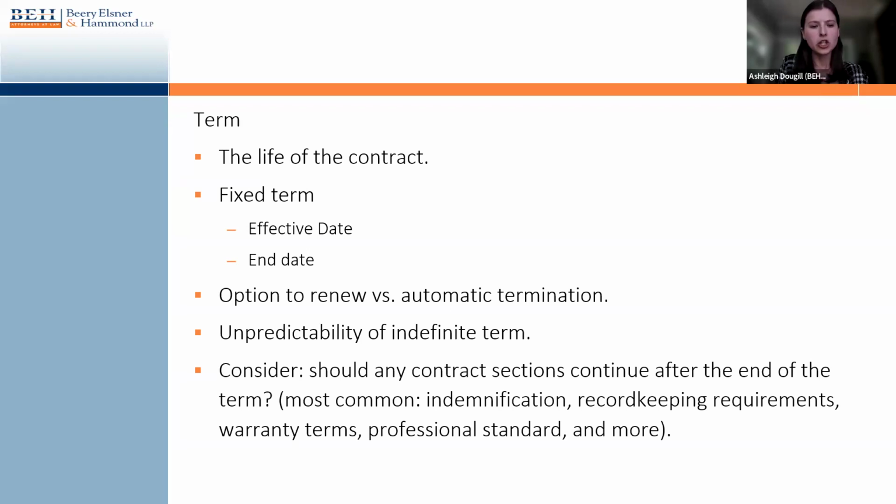We generally discourage indefinite terms just because they are unpredictable. You don't know where you and the contractor are at now, but who knows how circumstances will change, how cost will change, how the actual people who you're working with at the contractor's business will change, etc. So at minimum, we always recommend that you at least build in the ability to periodically check in on the contract's terms and renegotiate the terms periodically if necessary.